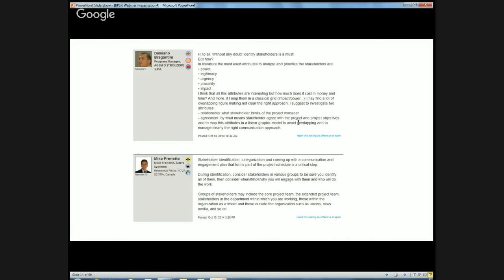Now, there's no denying that the stakeholder management processes, documents, analysis, all that stuff that you do during the startup normally of a project, they are great tools for communication. They give you a great grounding for how you are going to communicate on your project. But you cannot create engagement or change behavior or have decisions made by filling in a power and impact grid. You need more than this stakeholder analysis piece of work that you fill in at the beginning to make people understand what it is you're trying to do. You need actions. And project reports are a good way to get action, to talk about action, and to record action.